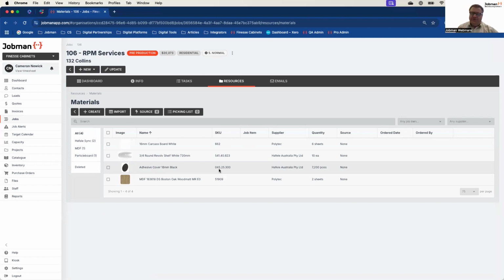It makes sense that just because we've created range pricing options, those aren't the actual materials we're going to order. They're not linked to a specific SKU from a supplier. For example, you might buy and manufacture and produce sheet metal items. You have a quote pricing range set up for 3mm cold steel. The reason being is because there are multiple suppliers you can buy that from. From a quoting point of view, it's not important so long as you've got your range pricing set up to cover, and you can use the smarts of Jobman's parametrics. We can build the number of sheets out from that quote and then have that come into the material resource, which provides our first part of the reporting, which is the estimate.